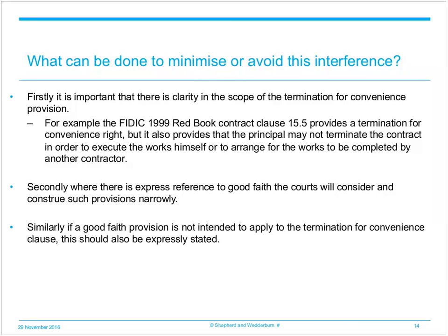Secondly, where there is express reference to good faith, be aware that the courts will consider and construe such provisions narrowly. Therefore, if it's intended that the good faith provision should have teeth and, for example, should apply to termination for convenience provisions, then that should be expressly stated. Finally, similarly, if a good faith provision is not intended to apply to termination clauses, but is intended to apply to other clauses, again, that should be expressly stated, so as to avoid any doubt as to what both parties are contracting to.